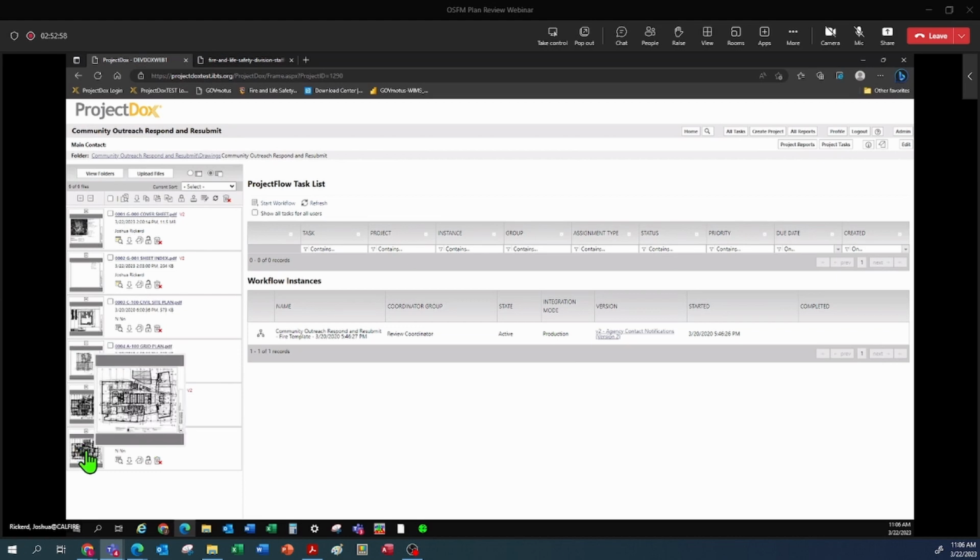If the data in here is for 3rd floor, but your file name is wrong, you can relabel it and insert it. But the original thing that you uploaded, especially if we've already done a review, can't be fixed once we've done a review. We don't want to leave it in there. If we make comments on it, we don't want to delete it because we don't want to lose the history, because it'll still be applicable to your content. Your comment responses would be, comment addressed and placed on new sheet for 3rd floor. So hopefully that makes sense. If you have questions, please ask us. I'm sure you'll hear from us if we find issues on your uploads.